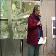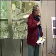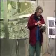And for the gentleman or the person who spoke about claims for damages, now is the time to go through your house and take videos and photographs. And think I'm odd, but the most obnoxious thing on the wall is going to fall, in all probability. He didn't say it, I did. So before they start construction, take your photographs and have a witness with you when you do it so you can have a better claim. We learned that with BART.